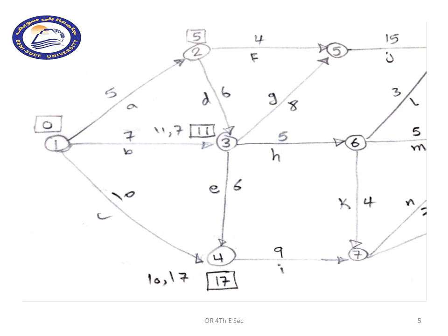So if we selected number 7 or the lower time, this would not give enough time for all the activities before node 3 to be completed, and would make the start of E, H, and G not possible, because they are waiting for activities that are not yet finished. So in the comparison of more than one time, we take the higher amount, which is 11 in this case, to represent the earliest starting possible time for node 3.